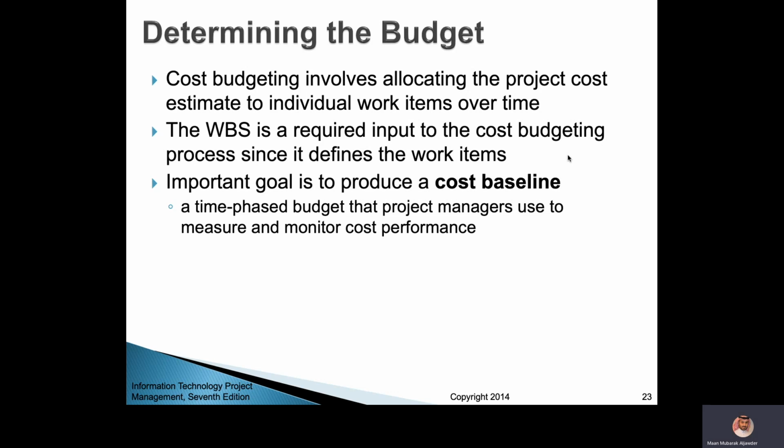So after estimating, you need to assign these estimates to the items that you have in your work breakdown structure. And this will be your budget. This will be your baseline. You have to stick to this later on, because this is your time-phased budget. And you will see this now in the coming slide.